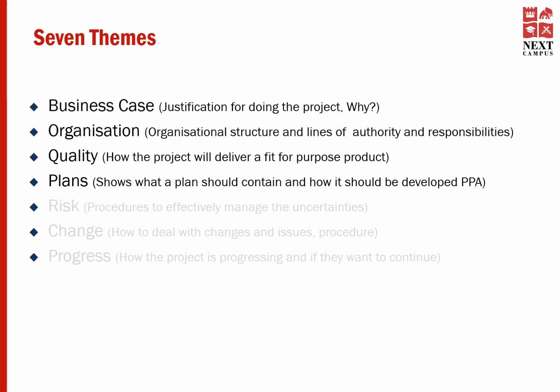The project plan, which is a high-level plan and is mostly used by the project board. The stage plan, which acts as a day-to-day plan for the project manager. And the team plan, which is used by the team manager.